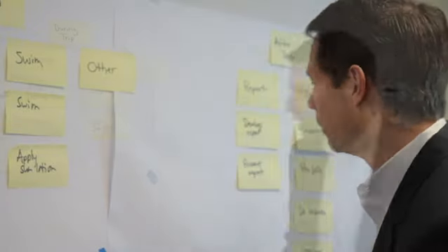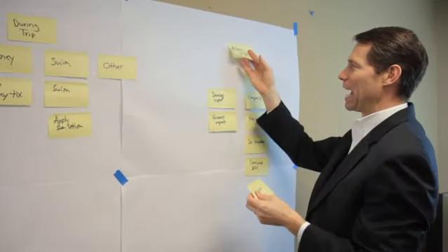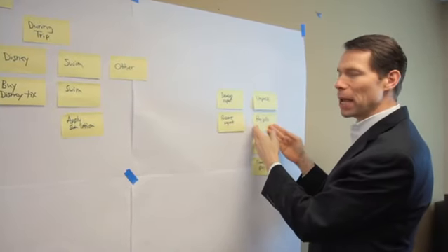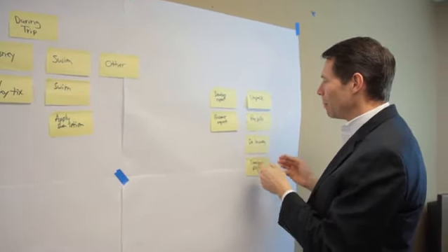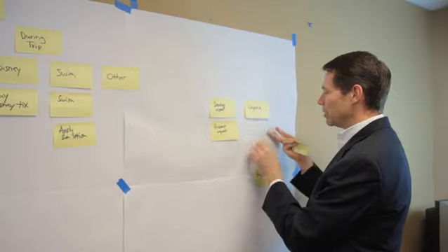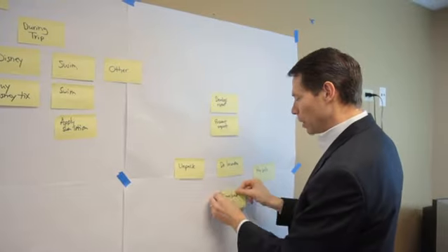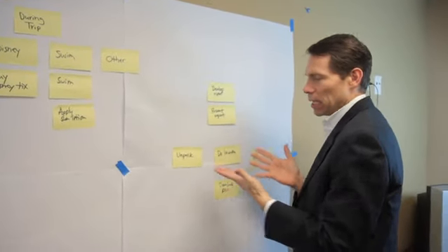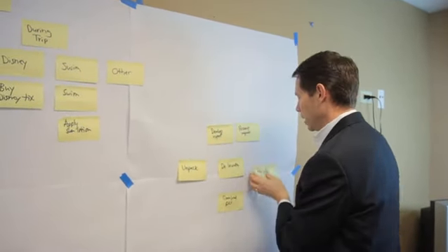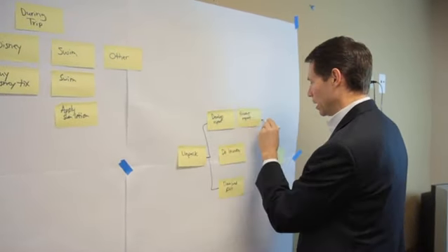Let's check it out. So I go to the end here, and what do you think I'm going to do last? First of all, actually, I'm going to get rid of my headers here because I'm not going to actually use those headers. What do you think I do last? Download pics, do laundry, pay bills, or unpack? Well, I'm probably going to pay bills last because sometimes it takes a while for the bills to actually get there. And then, doing laundry after unpacking, that's generally considered a best practice, so I could do that. Downloading pics is maybe dependent on unpacking, but nothing more than that. Developing the report before we present it. And so just to see what that's starting to look like, I could draw my lines like this.